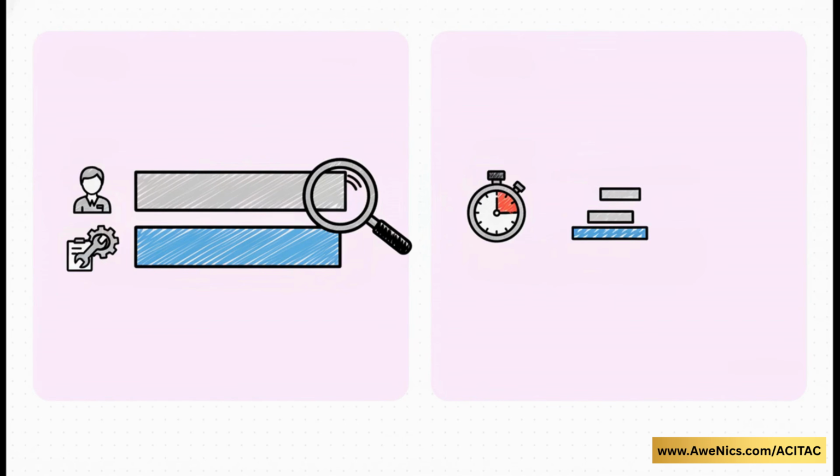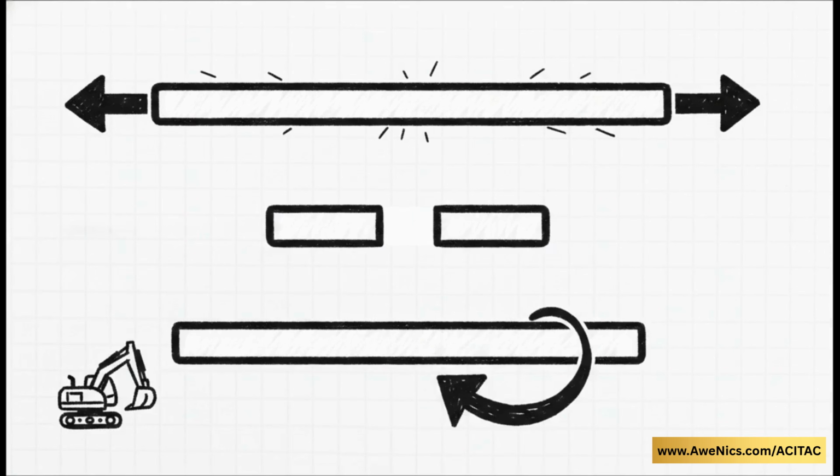Now, notice how there are 2 bars for every task. That top gray bar represents your original 94-day baseline schedule. The bottom blue bar represents your leveled 99-day reality. By comparing the top gray bar to the bottom blue one, you can pinpoint exactly where time was manipulated to free up your heavy equipment and your supervisors. When we look really closely at those blue and gray bars, we can see the software used 3 very specific maneuvers to resolve those conflicts.